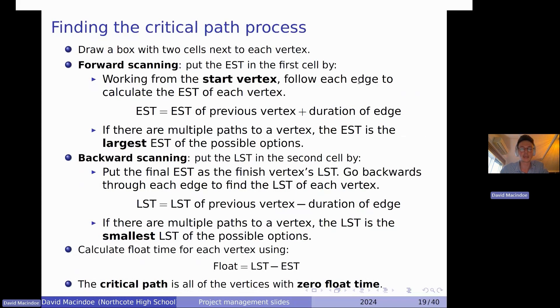And then the first thing we have to do is what's called forward scanning. What that is doing is we're putting in these earliest start times, these ESTs. At the start vertex, the earliest that the start could start is at time zero. So we just put zero in the first box on the left. And then as we go through each edge, each activity, we're just adding on the duration of that edge to the previous vertex's earliest start time. Now, if there are multiple paths to a vertex, the earliest start time is the largest of those possible options. If you've got two different paths coming together, just always use the largest one.